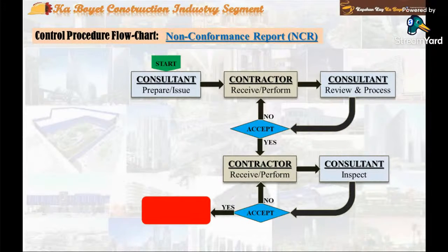Second, the contractor's project contract retention payment shall not be released to the contractor until all outstanding open NCRs are officially closed. But again, you have to remember that the project architect, engineer, or the owner has the final decision whether the payment can be released or not.